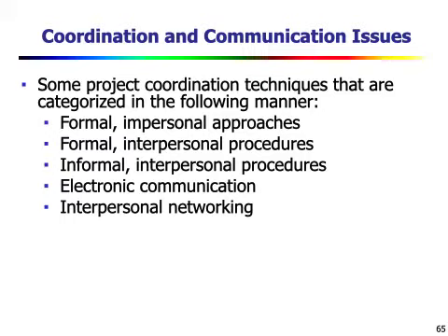We are going to develop a table like this, in which the rows represent the product functions and the columns are divided based on the framework activities, that is customer communication, planning, risk analysis, engineering, etc.